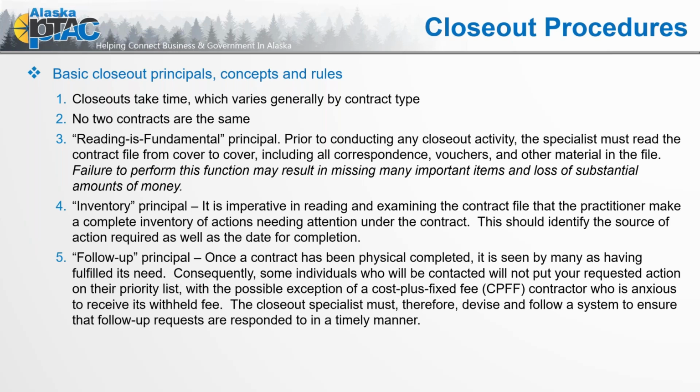Number 3, reading is fundamental principle. Prior to conducting any closeout activity, the specialist must read the contract file from cover to cover, including all correspondence, vouchers, and other material in the file. Failure to perform this function may result in missing many important items and loss of substantial amounts of money.